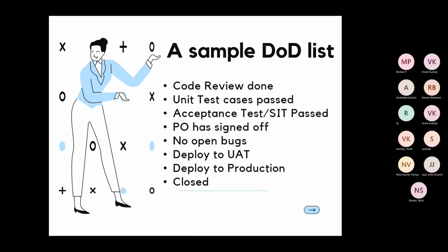Anything about the end user documentation? Yes, that could also be part of it. Because I've seen that many projects do production deployment after the end of every sprint. Not everyone does that. So once they do the deployment, it is also necessary to train people. Or for example, even if you do not go till a production release, even when you have UAT testing by the UAT testers or business people, they need some support or documentation to explain that functional flow or workflow. So even in that case, if you don't want to worry about who will be writing that, or whether it is maintained or not separately, even from a compliance point of view, you can very well add a point that for that work item or functionality, whether the end user documentation is maintained or not. That very well can be part of your DoD list.